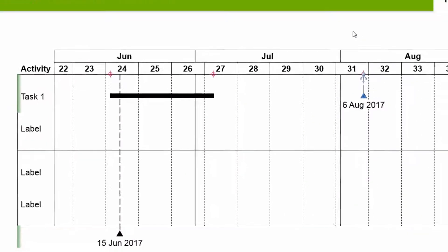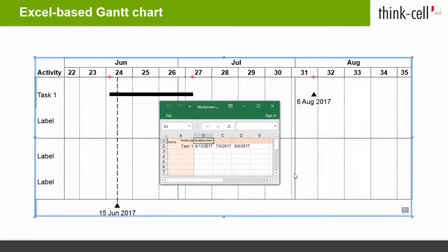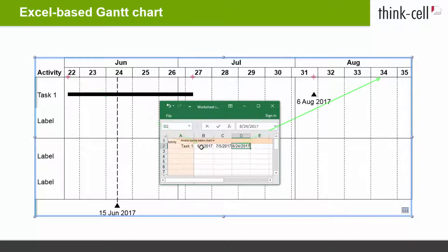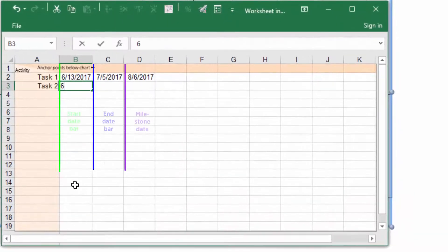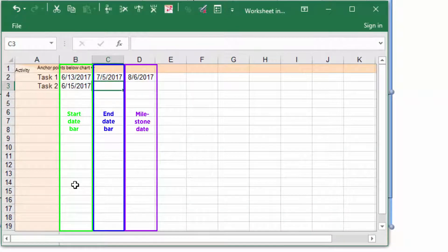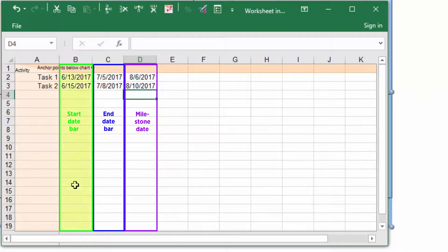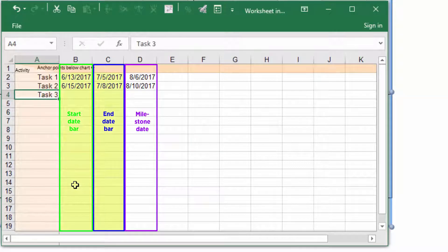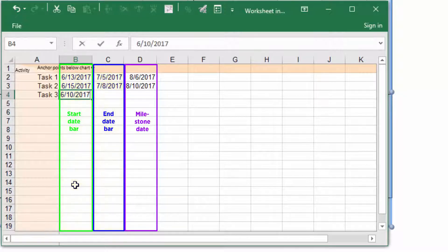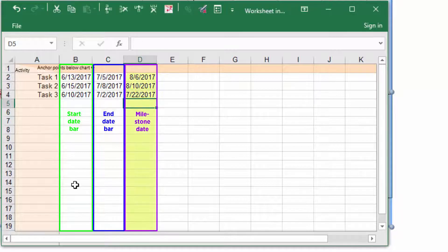From now on, these items will be updated automatically if you change the dates in the data sheet. When inserting more dates, we recommend sticking to the input pattern you used for the initial row — for example, keep using columns B and C for the start and end date of an activity bar in all rows.